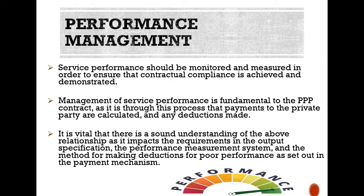Performance management. Service performance should be monitored and measured in order to ensure that contractual compliance is achieved and demonstrated. Management of service performance is fundamental to the PPP contract, as it is through this process that payments to the private party are calculated and any deductions made. It is vital that there is a sound understanding of the relationship as it impacts the requirements in the output specification, the performance measurement system, and the method for making deductions for poor performance set out in the payment mechanism.